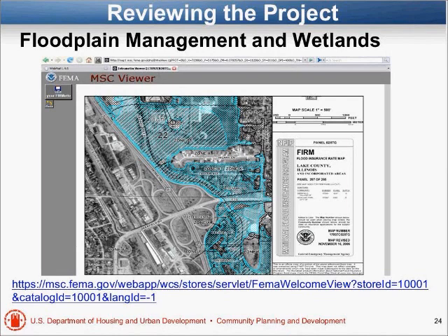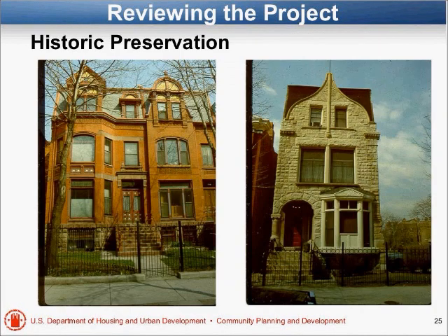And if you do have a site in a floodplain, what if it's something like this, where your whole neighborhood is in the floodplain? Sure, you could build in the floodplain. You just have to go through the 8-step process. You'll also be required to take out flood insurance. You'll be required to comply with the local ordinance that'll tell you to elevate the lowest floor at least above the base flood elevation.